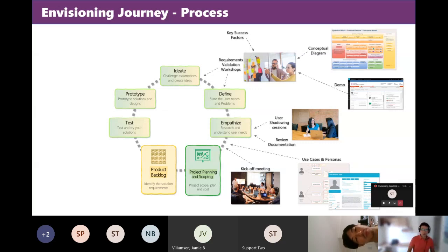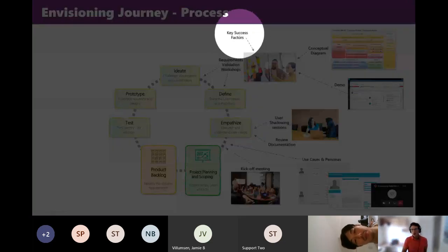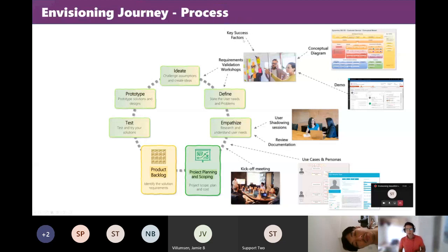For a customer service application, it could be to provide a system where all cases for clients are visible within one system. That could be one key success factor, right? So it's very important to define those. If you don't, then during the project, conflicting requirements, or 2 users pushing for 2 different requirements, might cause you some issues. If you have those defined, you can very quickly look at the key success factors and check if the specific requirements for some of your users fit within them.